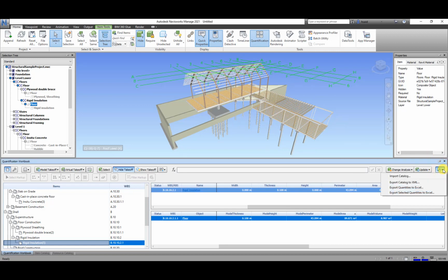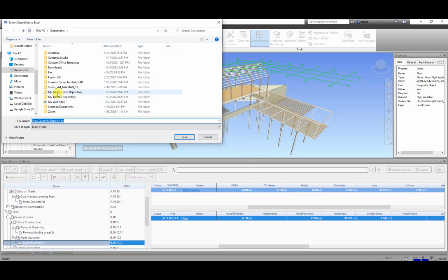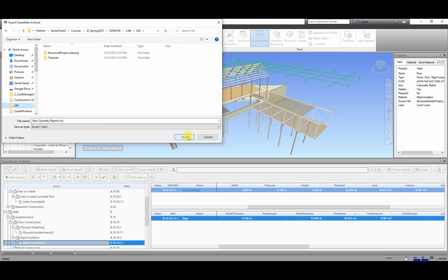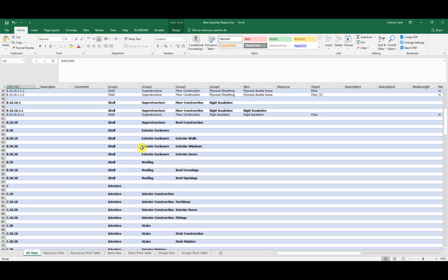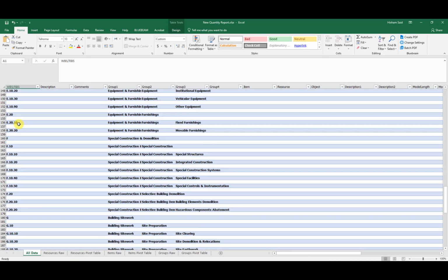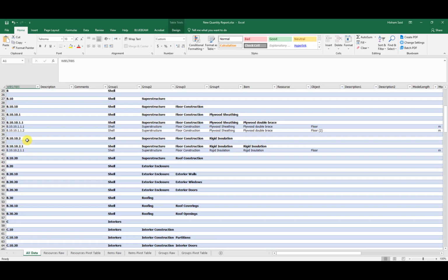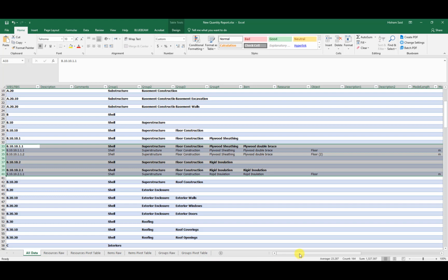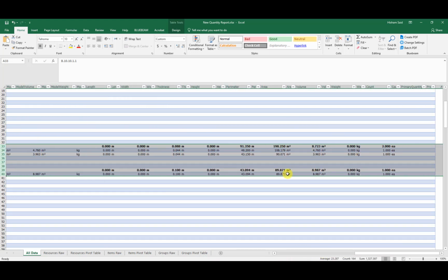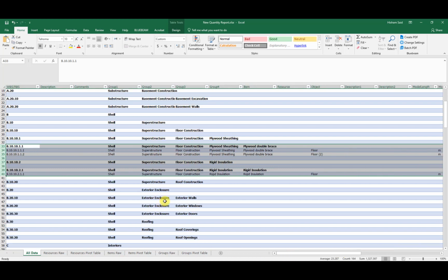One thing you can also do after all of that in Navisworks is export this estimate, this quantification, into an Excel sheet. I can do that into my documents, or you know what, let's do it in the folder I had originally, and it will ask you to open the file. Yes. And you can see here it has the breakdown of the Uniformat that we selected, and it's mostly empty except for the parts that we have done so far. It has all the quantities that might be useful for us when we do the cost estimates and cost rates and figure out eventually the total cost.